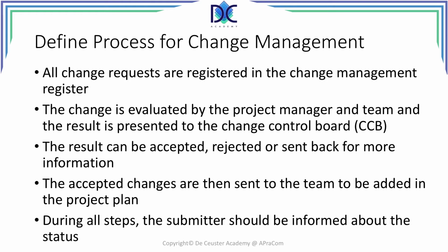The result can be accepted, rejected, or sent back for more information. Once a change has been accepted, it can be added in the project plan, and from this moment we will have new baselines and all reporting has to be done relative to those new baselines.